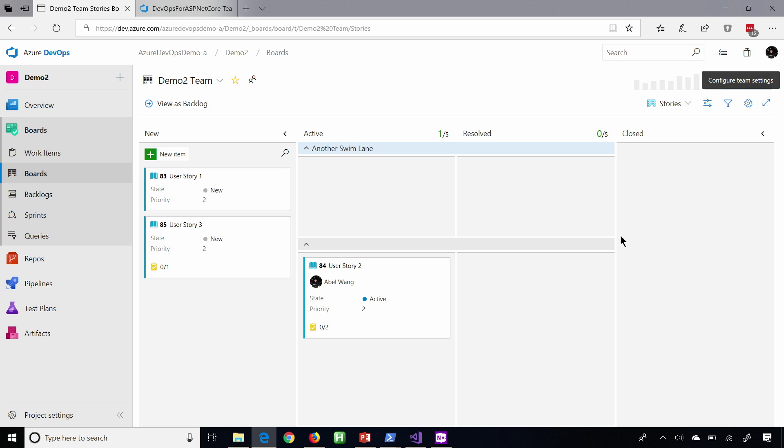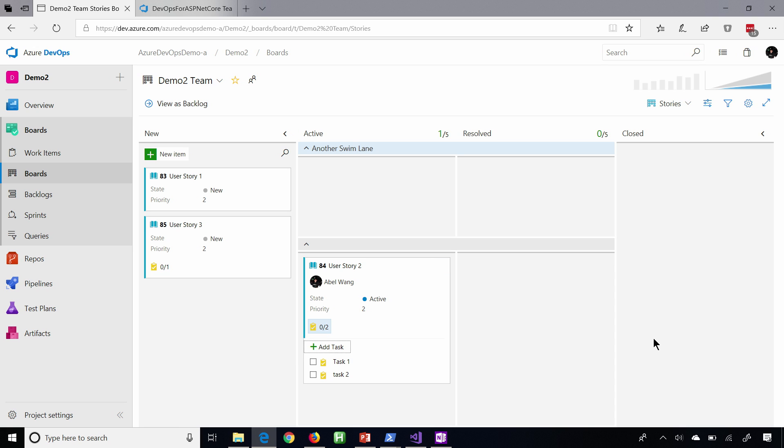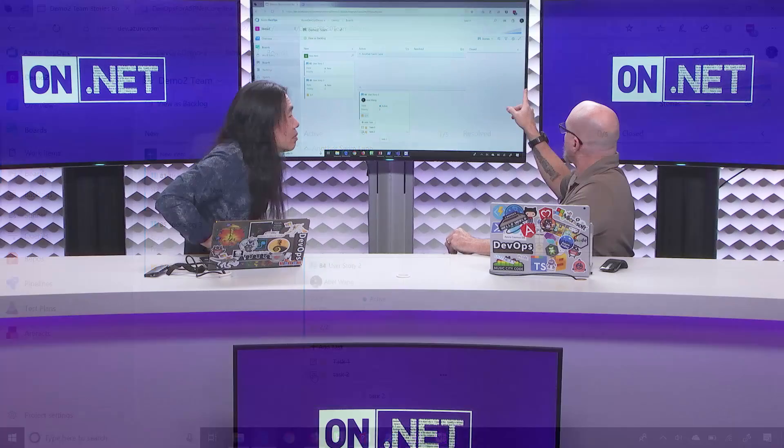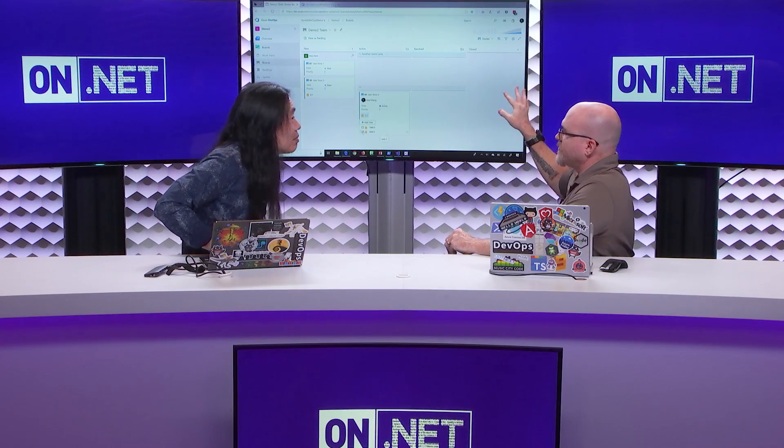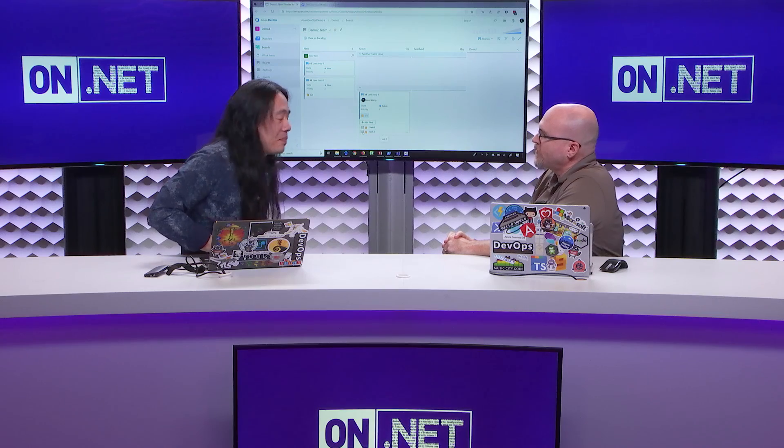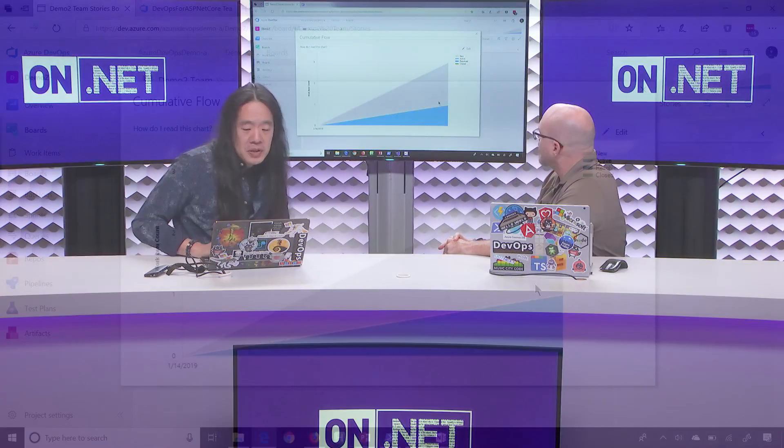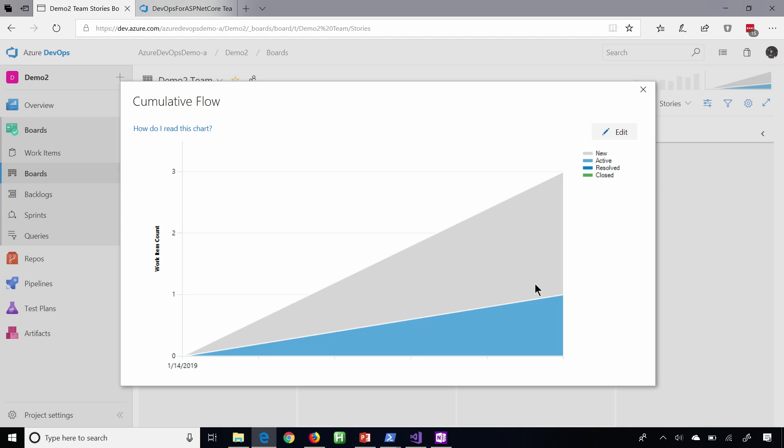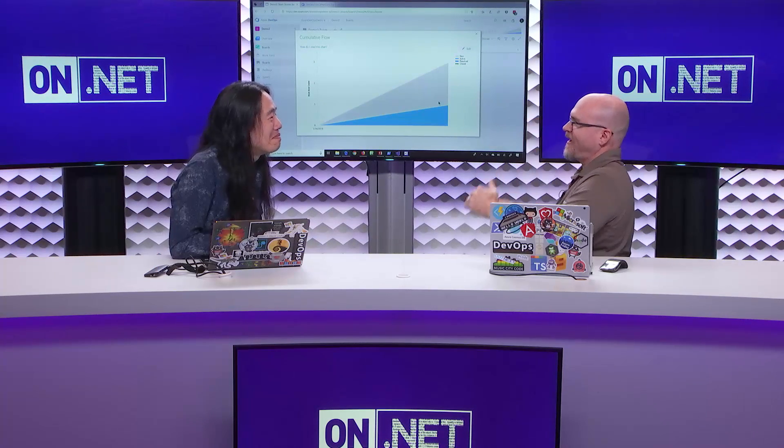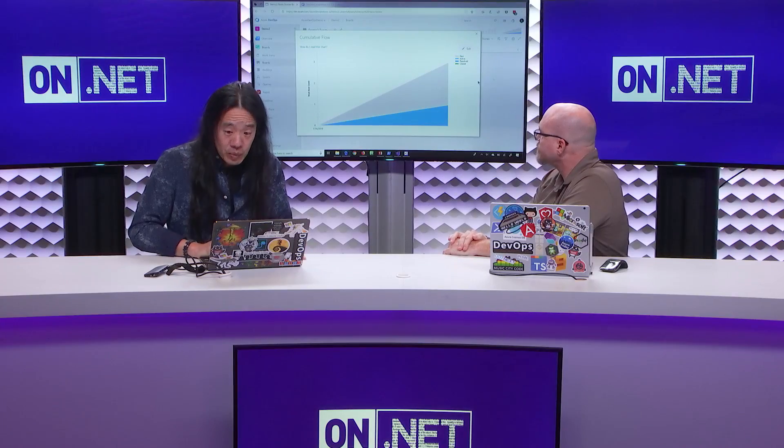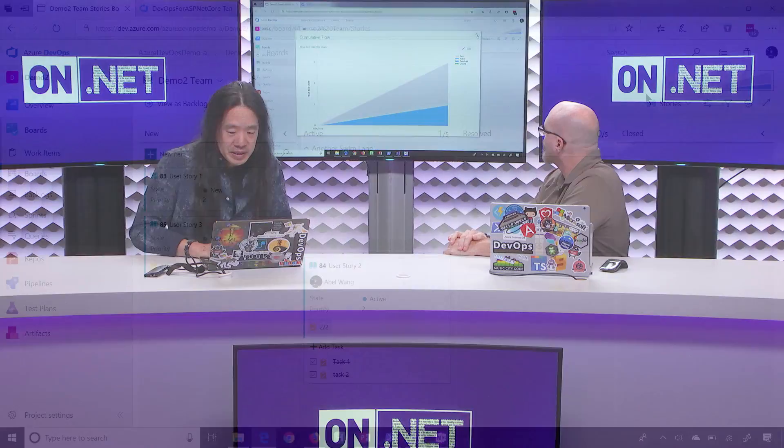Another thing that I like about this is it does show all the tasks that are associated to this particular user story. And as they're finished, they get crossed off. Now, one of the things I noticed is as you're working on this board, in the upper right, we started seeing some of these charts refresh. Yeah. So tell me a little bit about those charts. What do those do? So this is a cumulative flow chart. So as you're adding work and as you're finishing work, it'll start showing up on this. So these are charts that if you have like a Scrum Master, they can use that to judge and view, oh, how's the progress? What's the progress my team is using? So this is how we can do projections and estimates, right? We start to see closing between open and done tasks, and where they converge is where we think will be done. Yep. Okay. Yep, yep, yep.